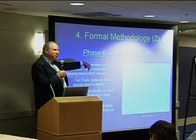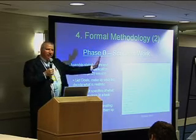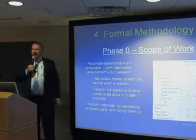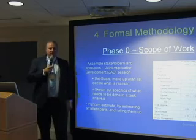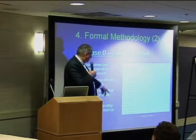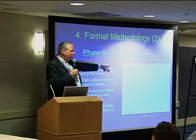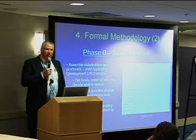So if you can come up with that hierarchy, what you can also do is go out laterally with the different kinds of skill sets of people that you may need in order to achieve something. So you may need help in set construction. You may need help in orchestra management, whatever. You can break that into the different things, and you can ask each person, okay, well, based on what you know about what we're talking about, give me a rough idea of how many days it's going to take you.